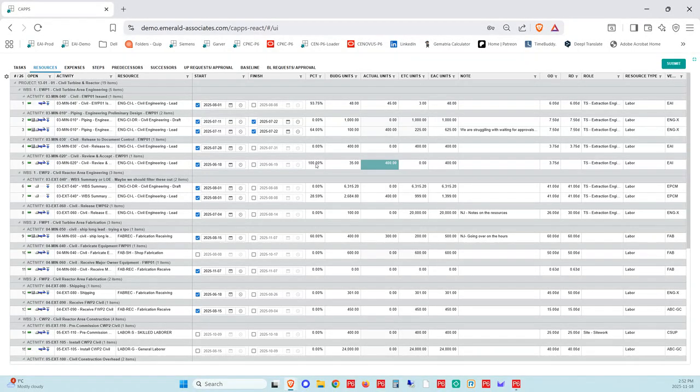So of course, the max in percent complete is 400, or the amount here. It takes the actual and the estimate to complete to come up with your at completion. So I might still have 100 hours left. So of course, this would be not a great activity because I've gone way over in my resources.